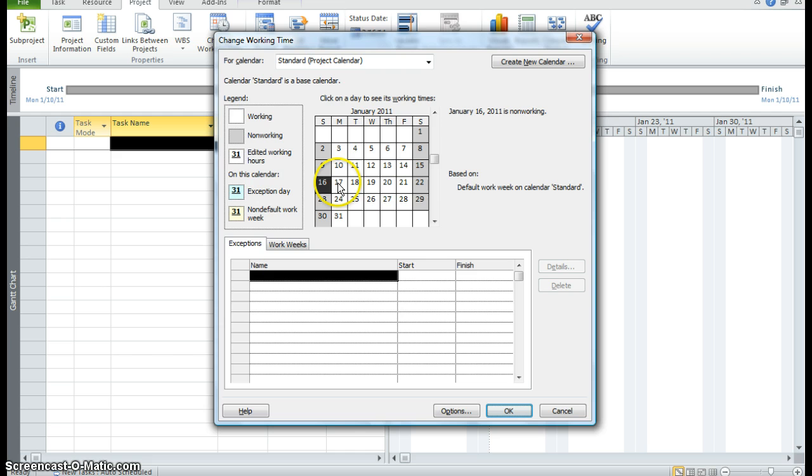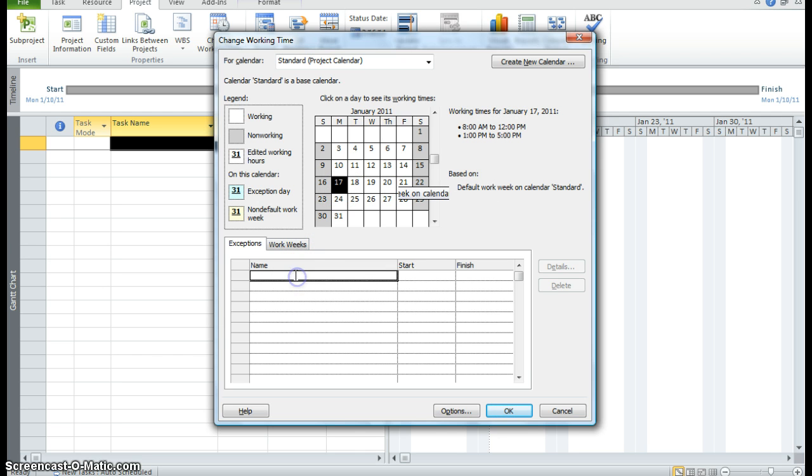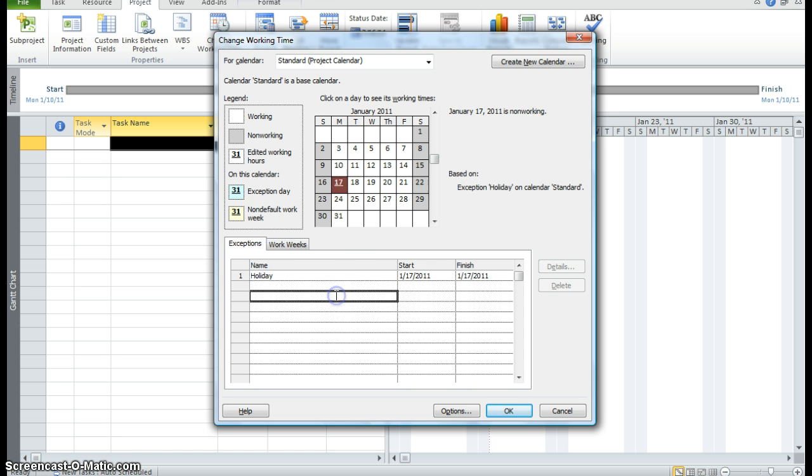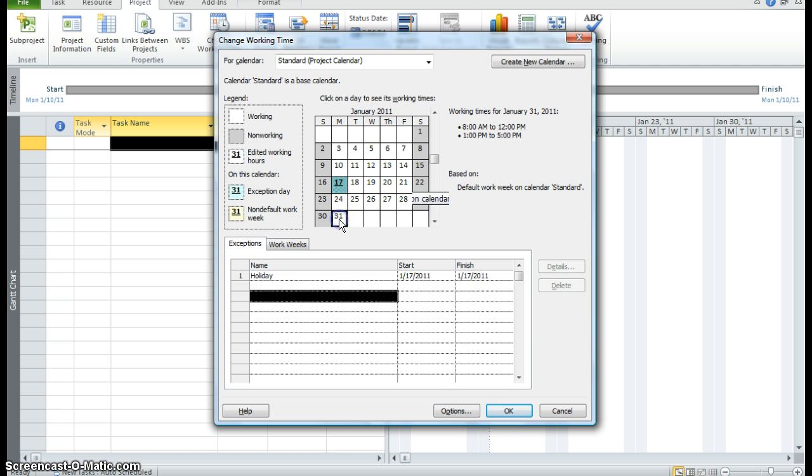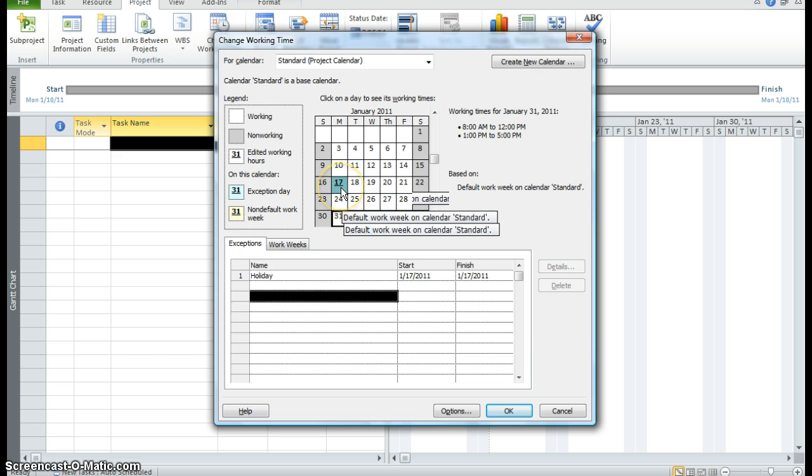So I'm going to put in a holiday for our company. And then I'm going to click out into the white area. You can see that January the 17th is in red. And it says exception holiday. Now if I click in a different area, you can see now it is green. So the project will not schedule any resources on that particular day.